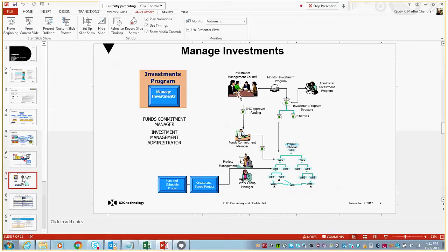So the budget will be flowed from the investment management to the project systems. Building an asset using SAP PS involves investment management. The investment program distributes the capital budget down into various WBS elements. The asset class will trigger the AUC, which is nothing but asset under construction, the term SAP uses to identify the asset which is being built.